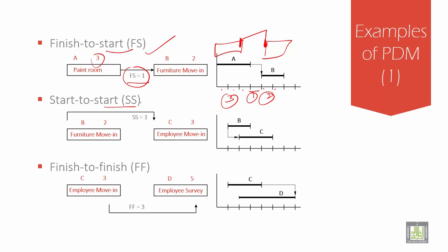Next is start-to-start, beginning to beginning. It is like this, beginning, beginning. This is start, this is start. This is what is shown over here. You have a lag of 1. B is 2. This lag of 1 is shown over here. Then 3 - 1, 2, 3. This is C.